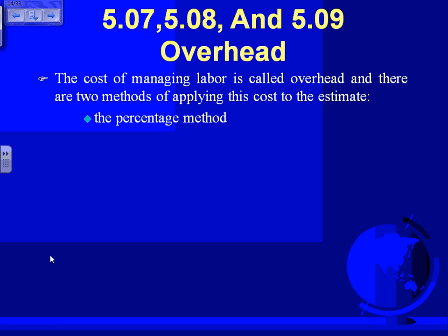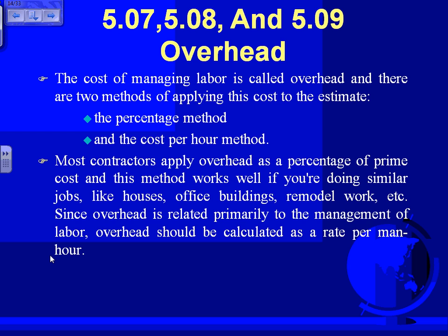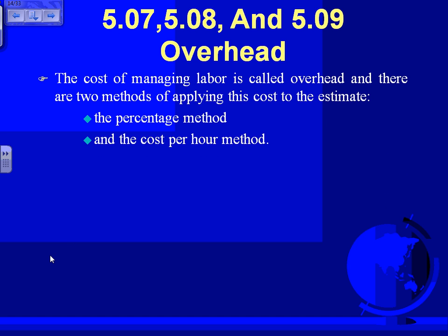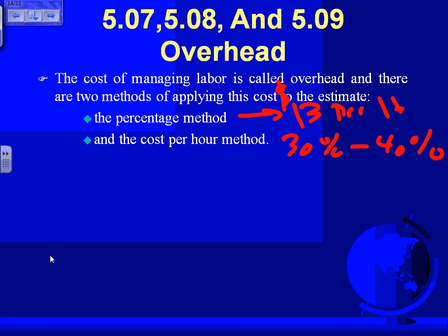And overhead. Now we added the overhead, two methods of overhead. Method number 1, guys, overhead, we said you're going to add, he suggests $13 per hour, or what is it, 30% to 40% overhead. And thank you, Chris, for reminding us, overhead is not just the office. Overhead is going to include all your licensure stuff, all your insurance, Uncle Sam insurance stuff that you have to do, bonding, insurance, labor agreements that you have to do, unemployment and so forth.